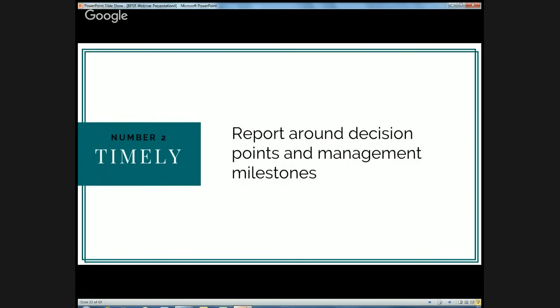The second tip for impressive reports is to make them timely. The best reporting timetable is the one that fits around decision points. My sponsor has a weekly board meeting at which he reports progress. So he needs weekly updates on a Friday from me, ratified in person with me Monday morning, in order to report back on Monday afternoons. So my weekly reporting schedule is built around that.